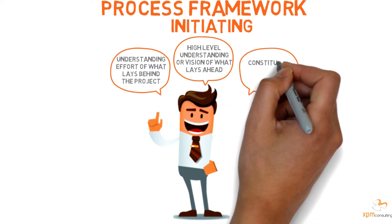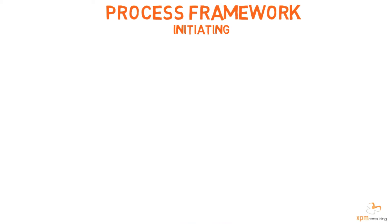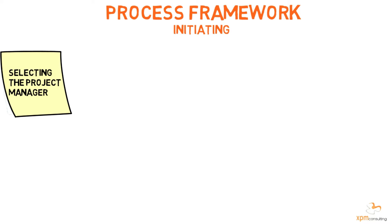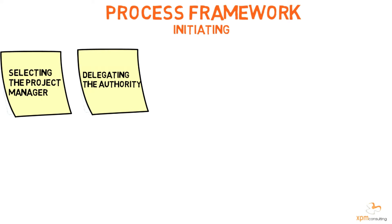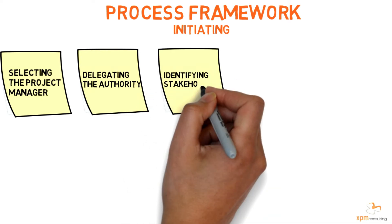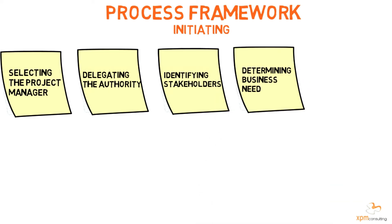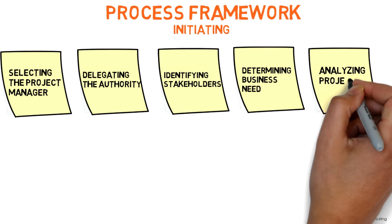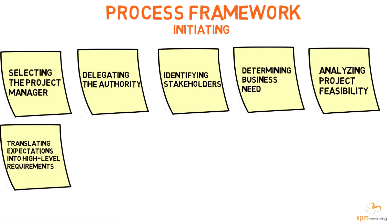Initiating also acts as a constitution that establishes boundaries that will guide and frame future decisions. Key initiating activities include: selecting the project manager; delegating to the project manager the authority to use organizational resources on the project; identifying stakeholders and understanding their influence over the project; understanding the project's business need, justification, and strategic alignment; collecting and understanding the project business case; and translating stakeholders' expectations and needs into high-level requirements.